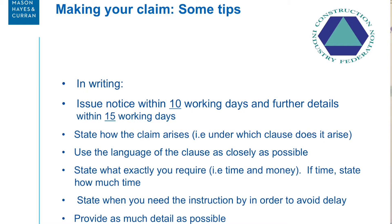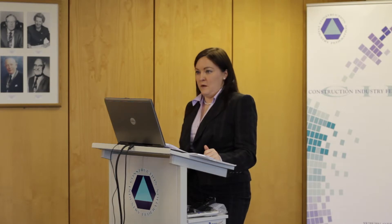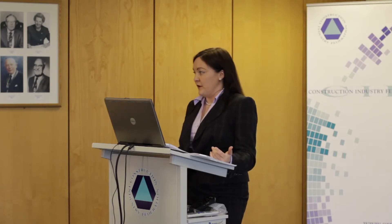It defies belief how we as adults cannot manage 10 working days - it's so basic and so clear in its meaning. If you know your ER is someone who goes around with his iPhone and you send him an email he gets two minutes later, then send it on the 10th working day. But if he wants post or registered post, you've got to send it on the 8th working day. If it got to him on the 12th day, that's not a valid claim - it didn't get in on time. You know about your claim from day one, so make it and make sure he gets it within the required time.